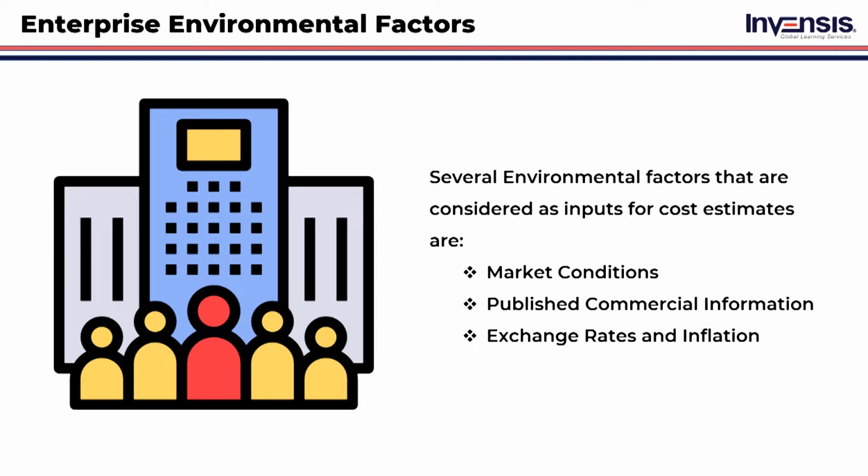Exchange rates and inflation. Currency changes and inflation must be recognized and included in the estimate cost process for large-scale projects that extend many years and use multiple currencies. These are the environmental factors that are considered as inputs.